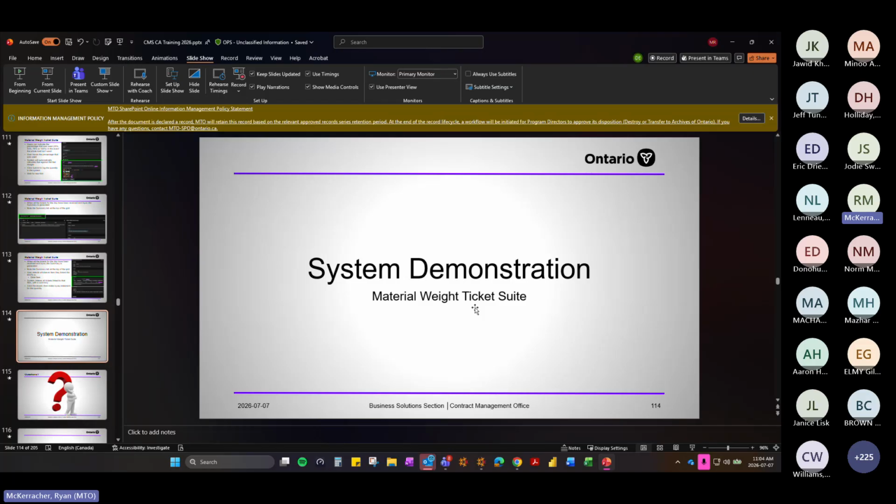No, because inspectors are able to post over a subcode quantity. If the estimate made during the design phase of the project says subcode 511 is 12 tons of gravel, but it ends up being 14 tons, we want our diaries to reflect what was actually installed, that actual 14 tons. And it's up to the inspector and the CA to identify if there's been an overrun and a change order or an OPA is required to adjust the quantity, but we still want that record.